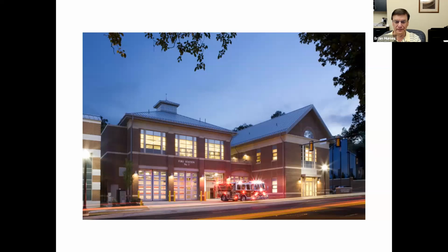What type of money on square foot when it was low, and what type of money are we gambling in, for lack of a better term, Never Land? I was quoting projects at $450 a square foot. Now we're seeing it at 600. It's a number that I don't even want to admit. It's something I can't even get a grasp on myself.